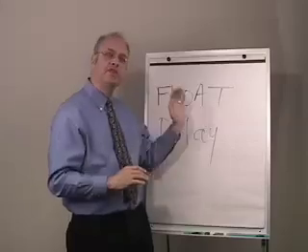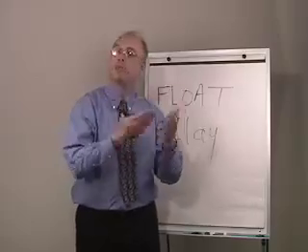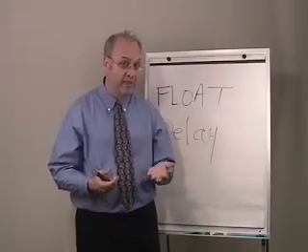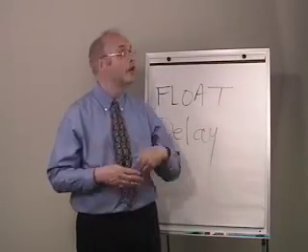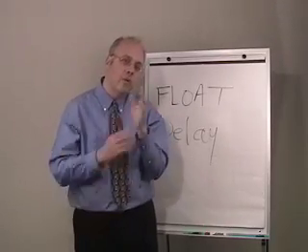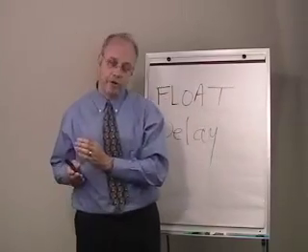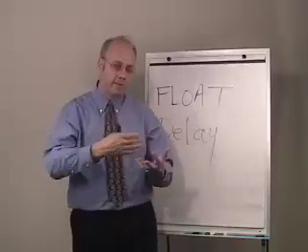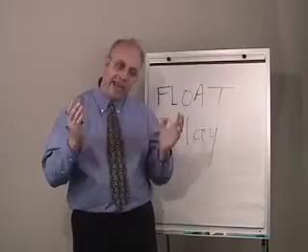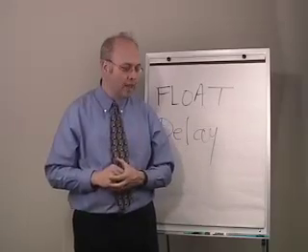And a lot of schedule analysis and delay analysis is based on an understanding of what has happened to the float on the project. Has it been eaten up by a delay to a particular non-critical activity such that that non-critical activity actually consumes the float available to it and takes over the critical path? At what point does that occur? When does the critical path shift from this path that was previously not critical to a path that is now critical? Those are very important aspects of schedule and delay analysis, which we'll cover in another session, but they relate specifically to how we deal with the consumption of float and how we keep track of it.